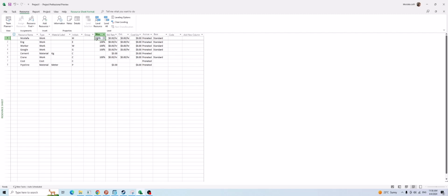It's not possible, right? Yes, but the point is, as I mentioned, this is just a name. You need to consider that Mustafa may be the name of a team. So Mustafa's team availability for you is 500%, which means 50 hours.